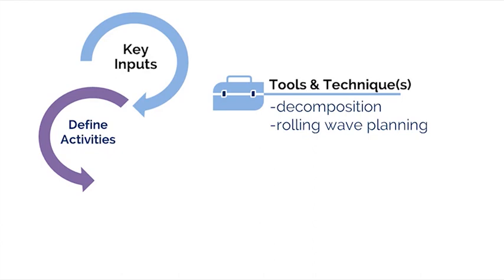For example, phases 1 to 2 might be broken down fully in the WBS. Phases 3 through 6 might be outlined only to the level of sub-projects. Then, while schedule activities for phase 1 are underway, the detailed planning for phase 3 would commence. As phase 2 is put in motion, planning for phase 4 would start, and so forth. In this way, rolling wave planning permits work activities to move forward on current and near-term deliverables while planning is still ongoing for future work packages.